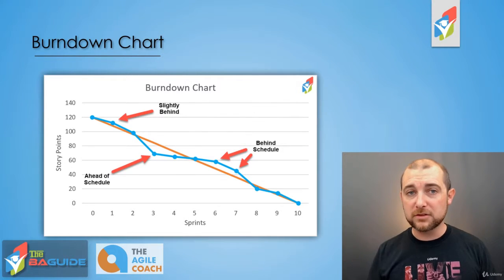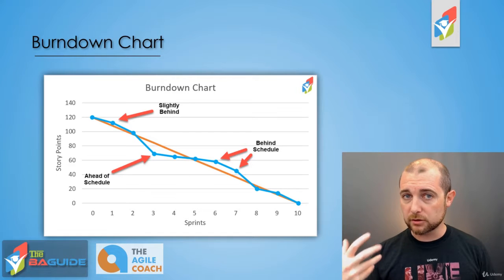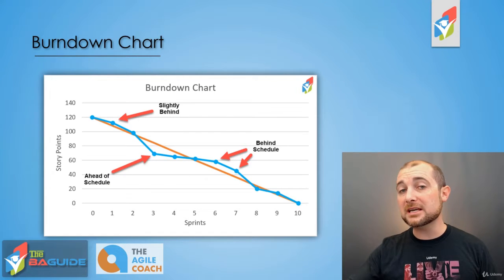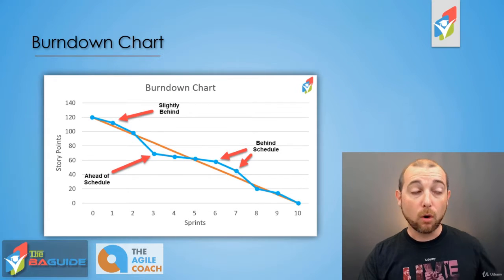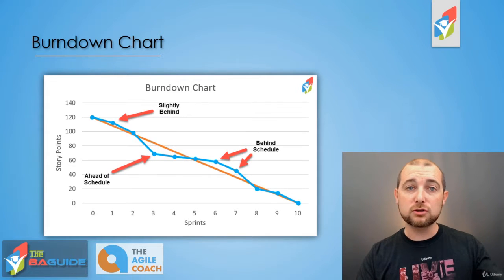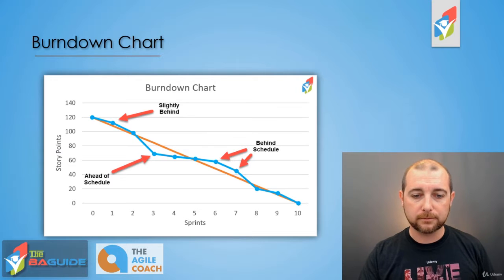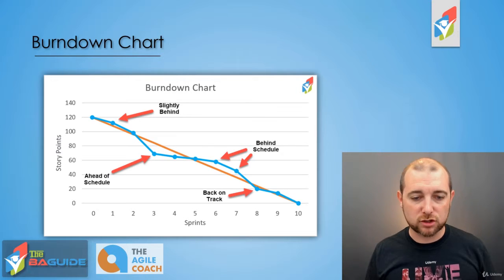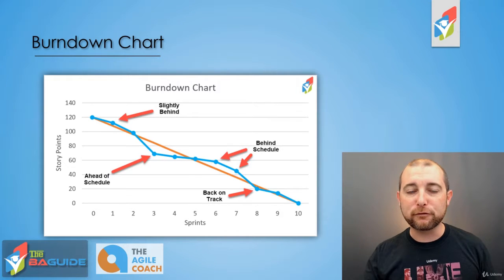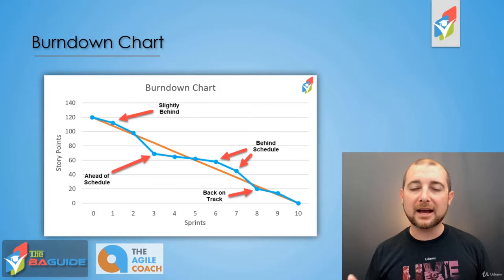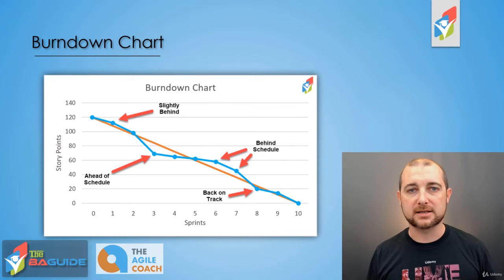As we look at sprints six and seven, we're now behind schedule and getting towards the end of the project. We've gone above the trend line, so we need to make some adjustments to complete the project in our 10-sprint timeline — or potentially add sprints if needed. In sprint eight, we get back on track, completing our story points and getting ahead of the trend line heading into the final two sprints, where we're able to stay on target and complete the project on time.